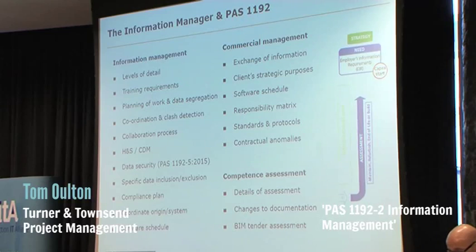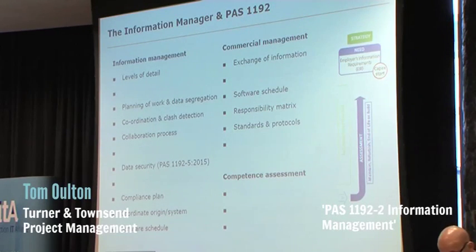Right, we'll go back to this one again. The BIM protocol, if we go back to PAS 1192, the BIM protocol has two appendices that form part of the contract. So back to PAS 1192-2, we can see the elements of the EIR that can be contractually obliged through the application of the CIC BIM protocol along with the role of the information manager. So all of these can be contractual. Everything else is guidance.